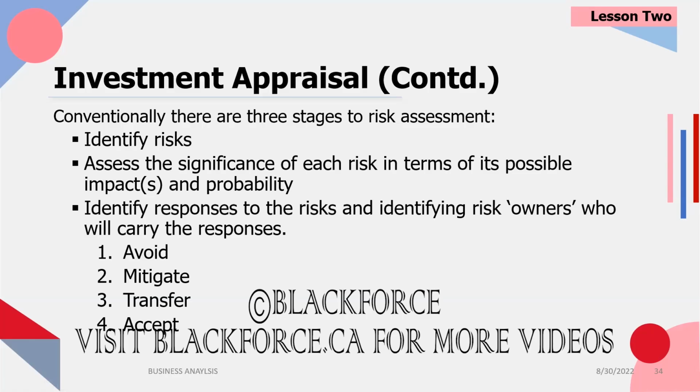The fourth option is acceptance. Sometimes 1, 2, and 3 are not options. What needs to happen here? The decision makers need to be aware of it, and they just need to factor it into their decision making and possibly make room for how they're going to address it when it happens. If the risk actually happens, it's the type of risk that can't be transferred, you can't avoid it. The only thing you can do is accept your fate, basically.